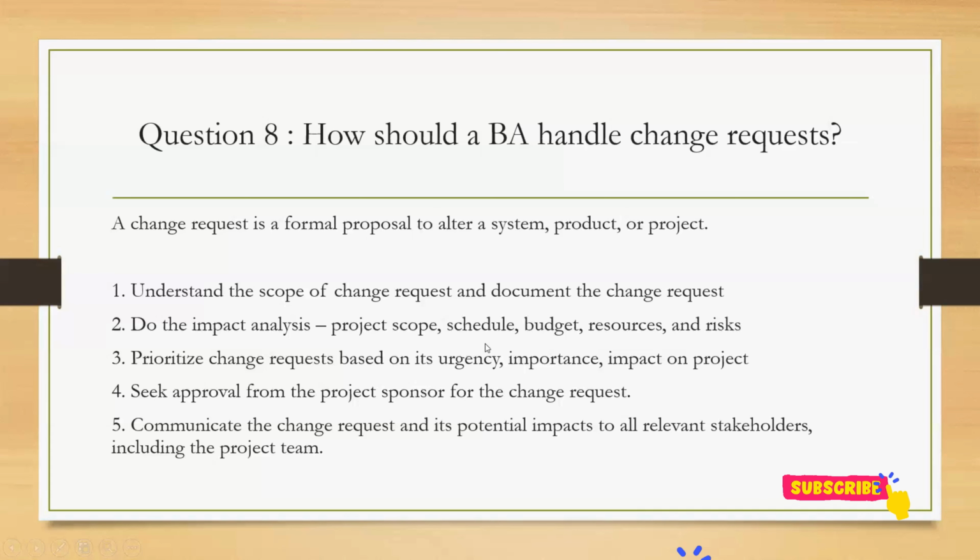Can we align this change request within our schedule? Can we implement it within the budget which we are having? Are the resources enough to implement this particular change request? What would be the possible risks that we might get if we implement this change request? Such analysis you need to conduct.